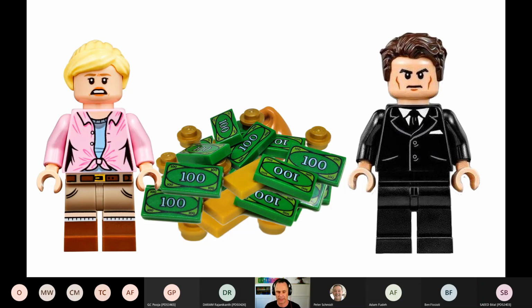We're gradually building up the capabilities that our users have got in production. And with each proven release, we're demonstrating value and we are asking for additional funding for the next phase. That's much less risky from a capital investment point of view. We're not having to set aside huge chunks of change for a long time. And CIOs and CFOs love this idea of incremental and iterative funding. And at any time, we can cut off funding.